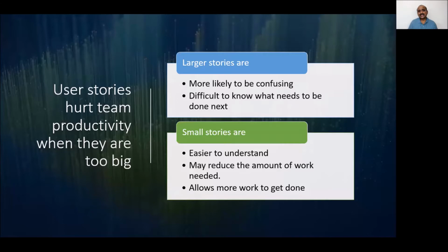So that is why user stories hurt team productivity when they're too big. I'm repeating, user stories hurt team productivity when they're too big. Larger user stories are more likely to be confusing, my dear friends, and they're difficult to know what needs to be done next. And usually they take more time than expected. You will see a lot of spillovers, the quality will suffer, and unnecessarily the team will be blamed.